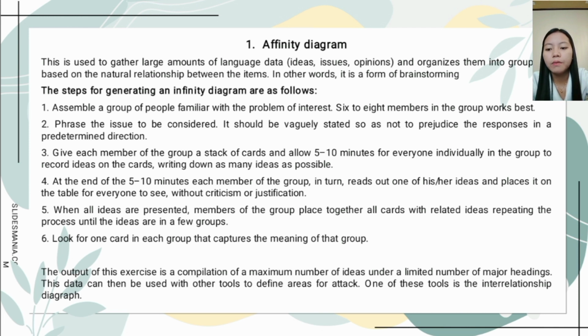And then fifth step, when all the ideas are presented, members of the group place together all cards with related ideas, repeating the process until the ideas are in a few groups. 6th step, look for one card in each group that captures the meaning of that group.